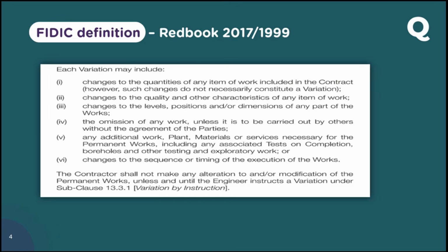Or for example, there is a building project in which you need to increase the depth, like instead of -3, you are adding -0.5 or something to accommodate one more parking slot or a basement parking. So again the level is changed. Because of that, you need more excavation, more dewatering. Everything will be coming. So that's one example for the change in position or levels.